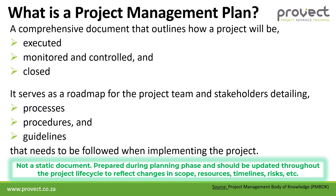It's important to remember that this document is not a static document. It's prepared during the planning phase of the project and should be updated throughout your project lifecycle, reflecting any changes in the scope, resources, timelines, risks, etc.